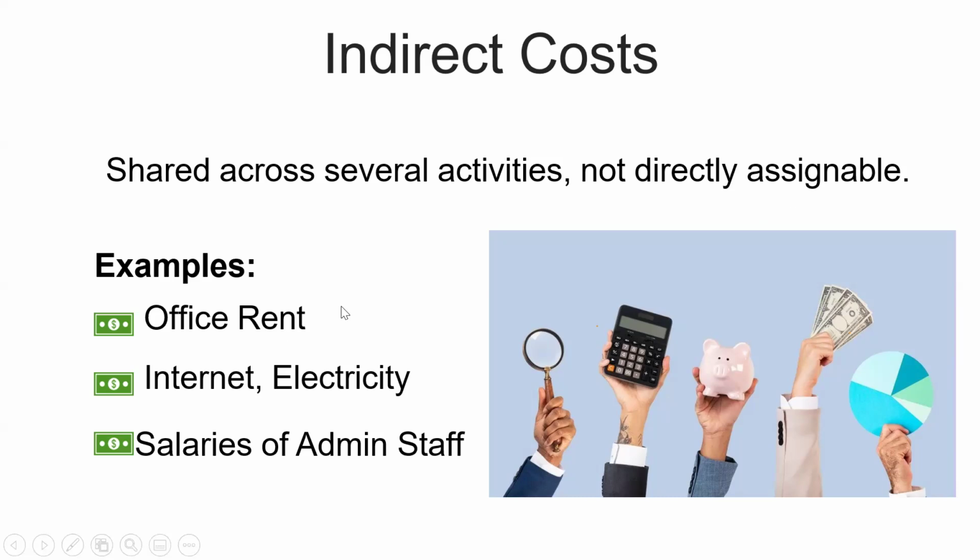For example, I gave an example of you carrying out a workshop, right? Maybe in your organization, you want to carry out a workshop, and there's a budget line for that workshop. That's direct cost. All that you do for that workshop is direct cost. But then maybe somebody has to assist in that, and that person is a human resource officer who is not directly linked to that particular project. He's there, he helps in all projects. And a particular percentage of money is saved every month that culminates to paying the human resource officer.